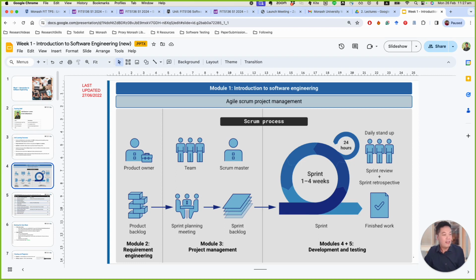Okay, thank you for your question. If this is the case, if I were a project manager, I would develop a contract based on the man hours, the actual time spent, rather than a fixed contract. So I would just keep it open.